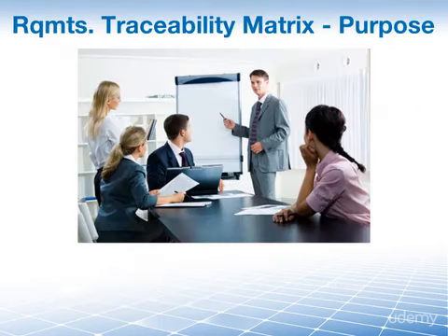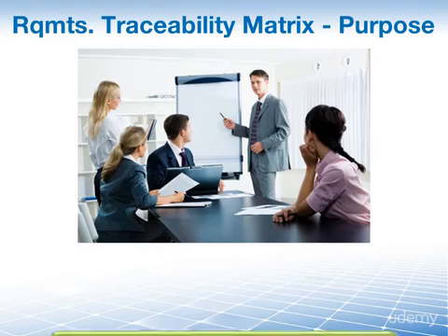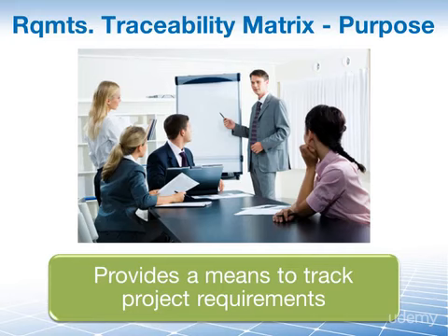You should create the traceability matrix as early as you can in the project, if possible at the beginning of the project, because it forms the basis for the project's scope and it incorporates the specific requirements and deliverables that will be produced. Its purpose really is to provide a means of tracking the defined requirements you defined at the onset, at the start of your project, throughout the project's life cycle.